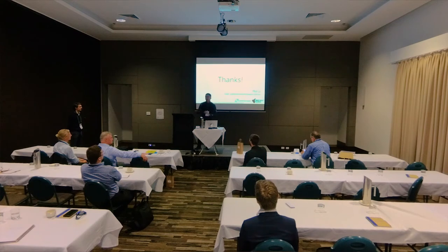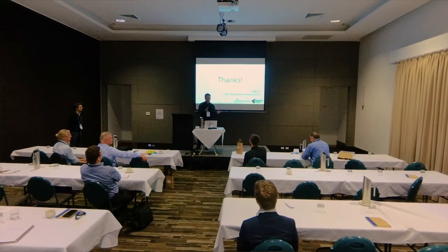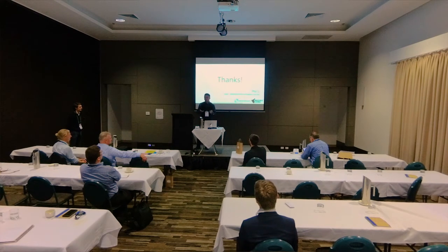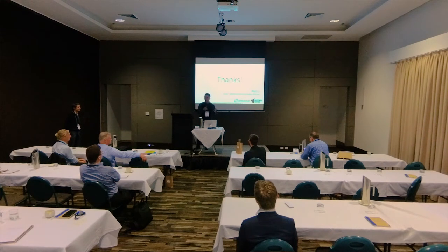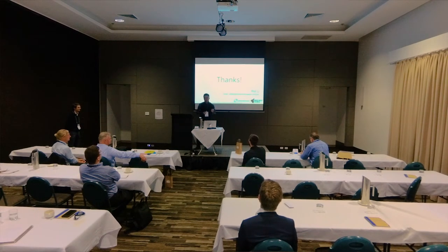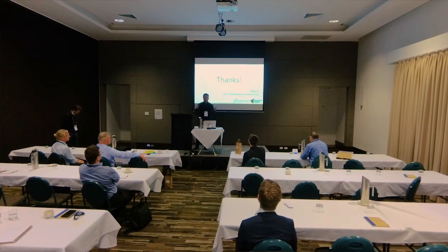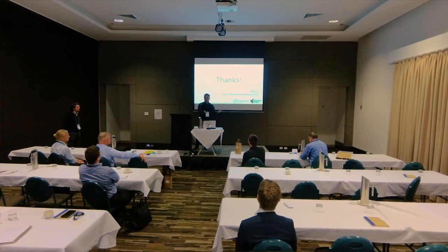After the construction, we're going to make a manual for how the whole system looks, and we'll provide 2-3 workshops to train the council members how to properly operate the system. We also align with the community contractor to tell them the frequency and methodology to clean and maintain the device. This education part is very important. The second part is that we provide a 12 months warranty, so in that time we can slowly let our management team understand how the project is working.